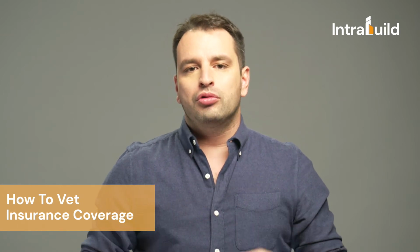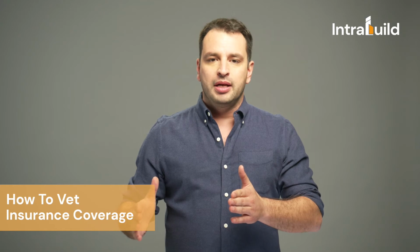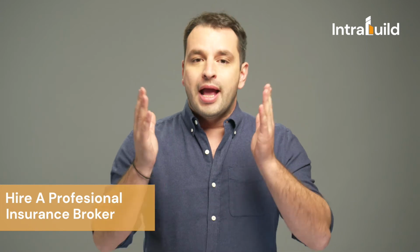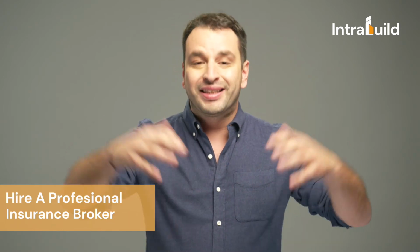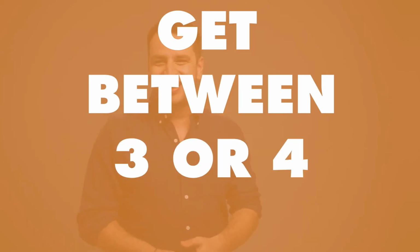So you need to make sure that your contractor has a policy that has action over bodily injury and that in any case you cannot get hurt. There is policies out there with 2 million GL and 5 million umbrella liability that cover only tiling and they have exclusions for anything else in the scope of work. The best way to make sure that your contractor has the right policy is to go to a licensed professional, an insurance broker, and pay him a fee to check your contractor's policies, not just the certificate of insurance, but his overall policy, and make sure that they can cover your overall scope of work and you are safe.